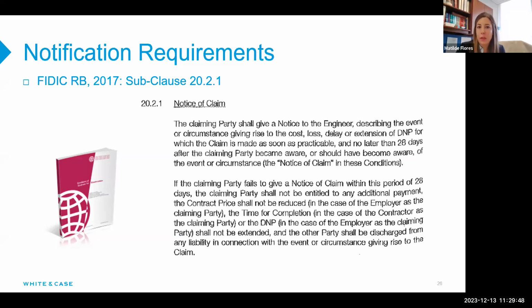Sure. So under the civil law, in general, the parties are also expected to conform to the notification requirements and the time bars of the contract, and these provisions are generally enforced and may also bar claims altogether. In certain circumstances, however, the civil law is a little bit more lenient, in the sense that it allows the contractor to rely on certain provisions of the civil code that may allow it to adopt a more lenient approach. Clear examples of this are the provisions on equity, good faith, and even, if applicable, waiver.